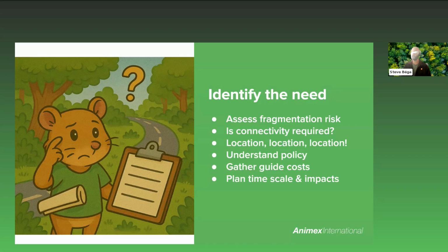Now, at this early stage, you may only need to provide indicative details within your reports or planning documents. However, understanding the most appropriate locations and constraints associated with different designs and materials is crucial. Ultimately, you don't want to propose a structure's location only to discover that it's not feasible and have to amend planning and other documents later. So it's better to get informed early and then refine details from there.